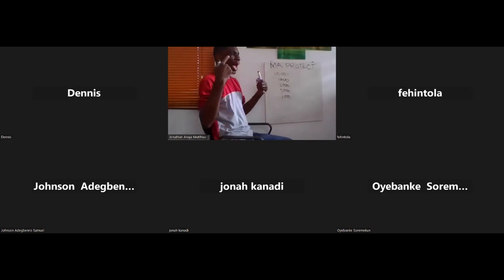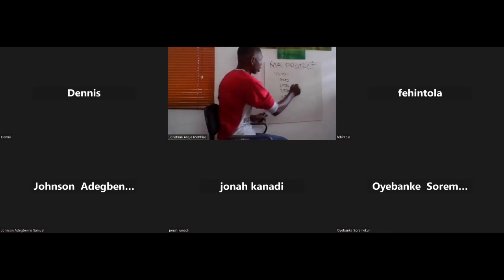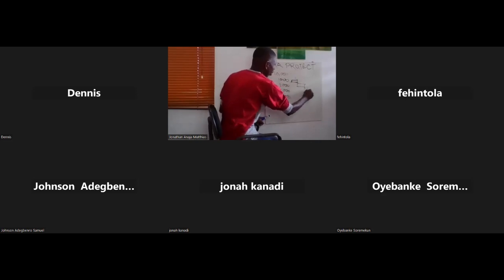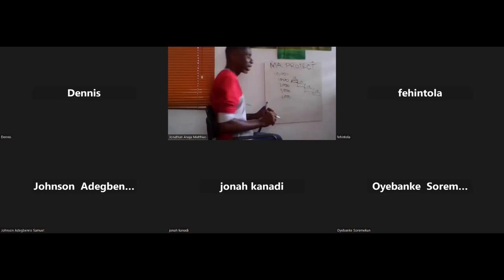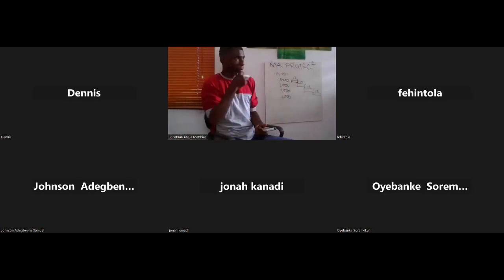So the way I did it last night was this. When we finished training 1,000, once training of 1,000 ends, we start training 2,000, we start training 3,000, we start training 4,000. Each of these training has a duration of 12 months. Are you getting me? Which gives me my 48 months.